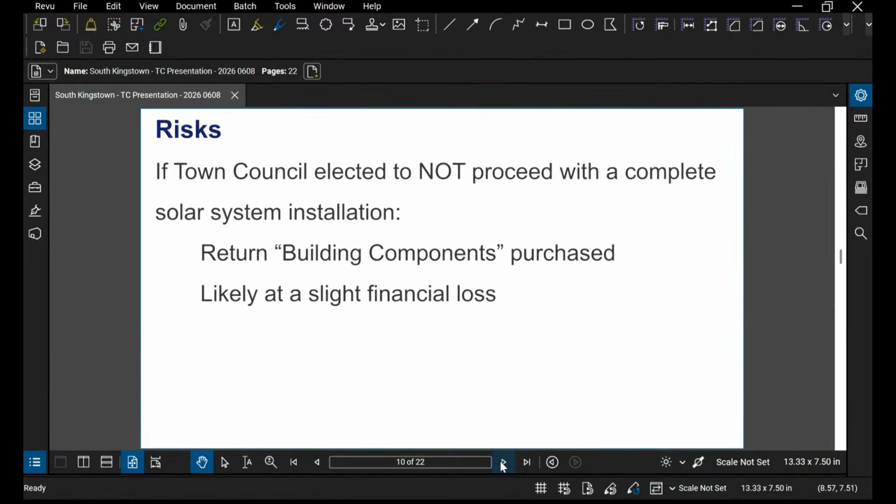That's the system that we'd be looking to put together for that. It is a non-proprietary system, so it can either be sold back or it can be written into an RFP for any vendor to be able to utilize that hardware. So that the entirety of the system will be written as an RFP. It'll go through the public procurement process. But one of the most important points I want to stress tonight is that quote will be coming at our next town council meeting, and it will be procured off the master purchase agreement.